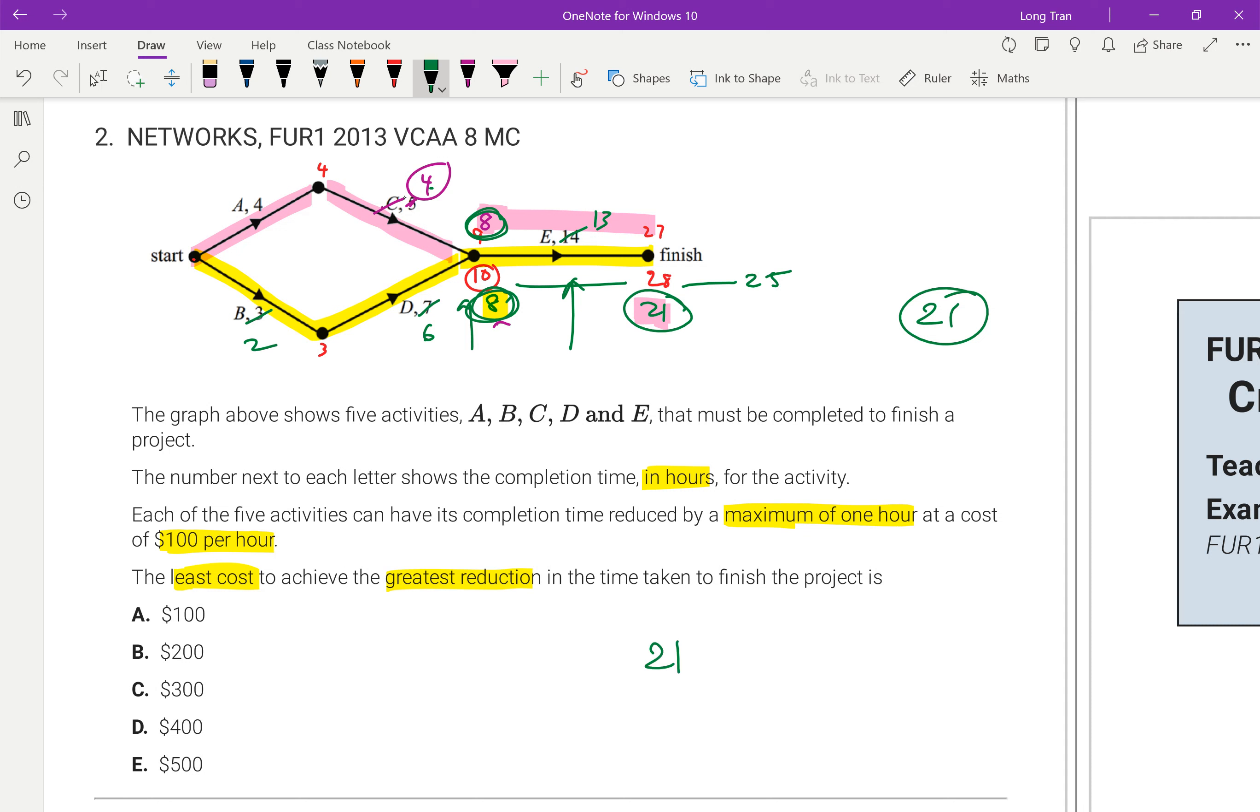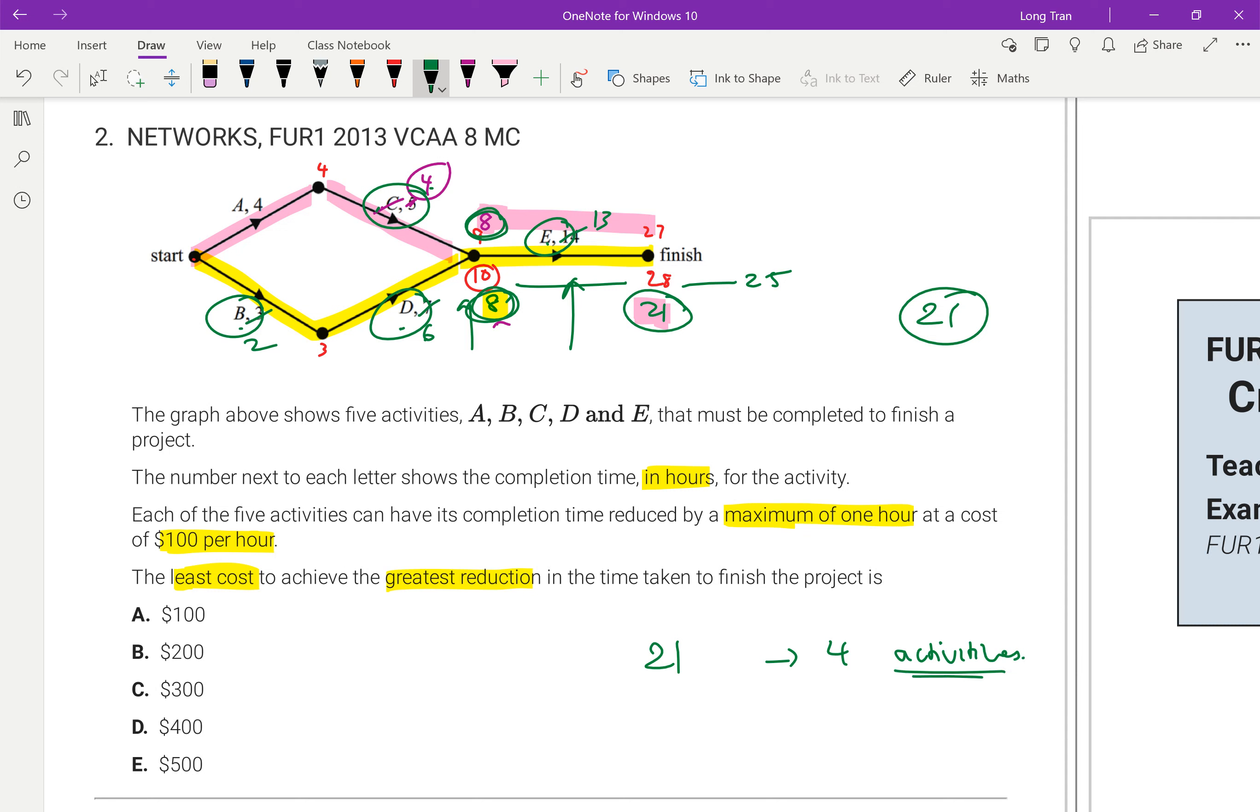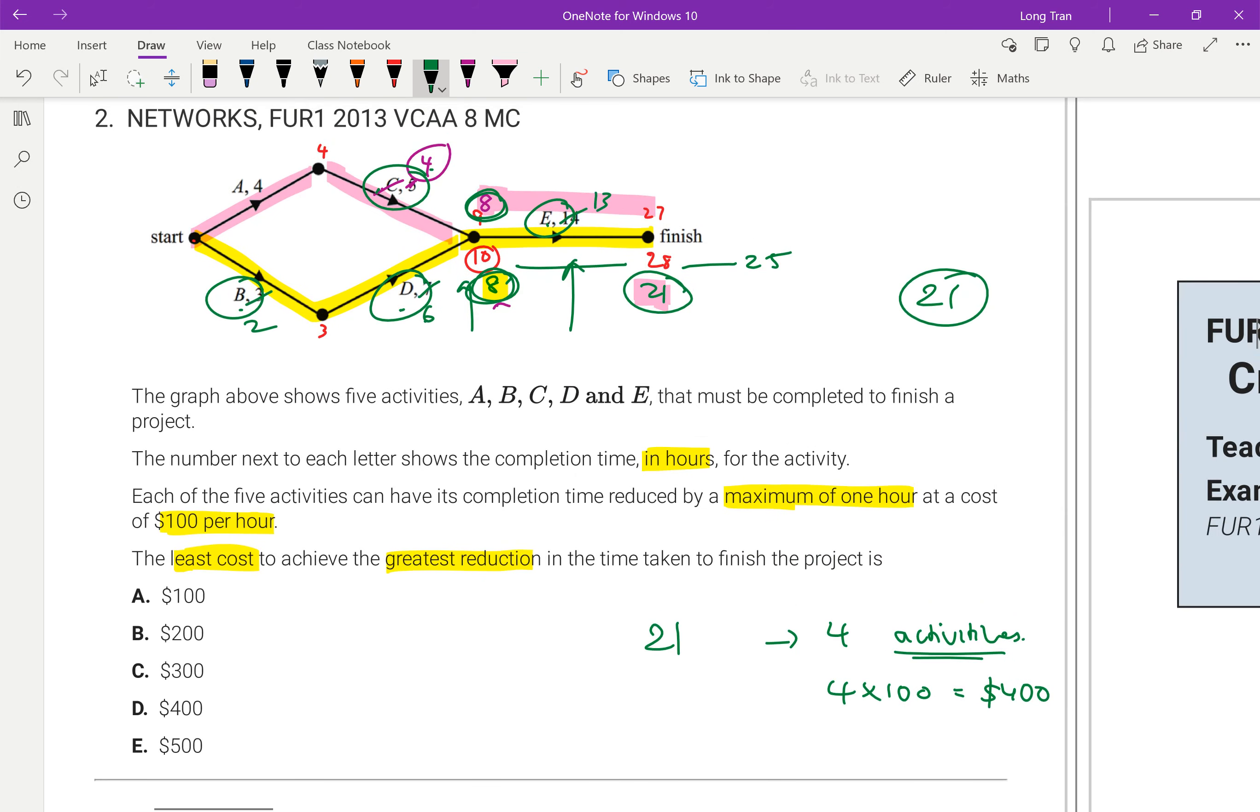So how did I get 21? I had to reduce activity B, activity D, activity E, and activity C. That's one, two, three, four activities, four activities that I had to reduce. So the four activities would imply that that's one hour each. That's four hours, four times the hundred means that I'm spending $400 to reduce this project down by four hours. So the answer has to then be D.